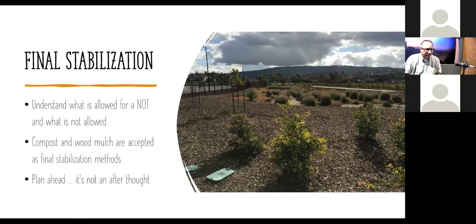Here's a question. If all exterior work is completed and just interior work is finalizing, we have obtained NOTs. Yeah, Paul, I did overstate that because of the amount of questions I get. I have seen a few projects get NOTs, and it may depend on what regional board you're in. The thing is, there can be no signs of construction outside, like dumpsters, porta potties, staging areas. They got to be gone.